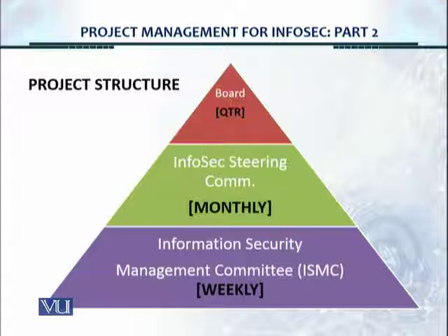It's a hybrid team structure consisting of 1 network resource from the customer organization, 1 application database resource from the customer organization, 1 systems resource from the customer organization, 1 information security team member from the customer organization, and then 1 or 2 consultants from a company like Delta Tech. And they form a hybrid team and become the champions of security. And together we call this team the Information Security Management Committee. They meet on a weekly basis and run the entire program.